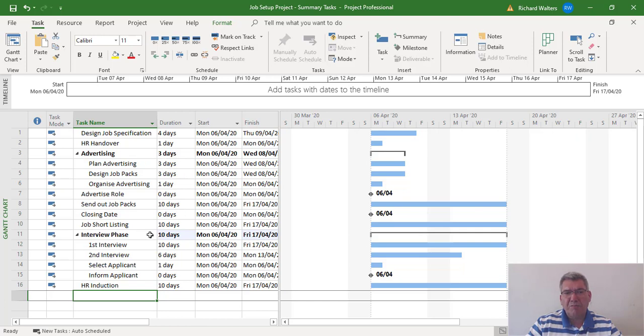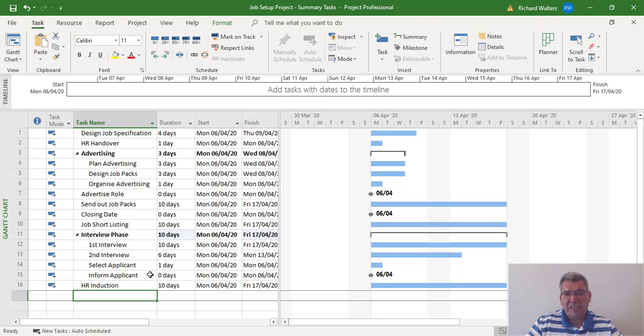seven days. Interview phase won't show ten days when they're linked. It'll show ten for first interview, six for second, so 16 days, and one more for select applicant. So we're going to see this change now by